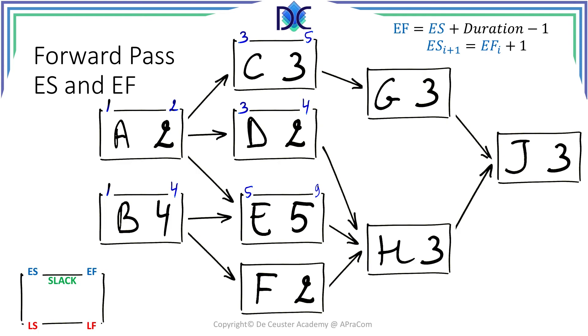For F it's a little bit easier. There is only one predecessor so F can start on April the fifth. F takes two periods so F will finish on April the sixth. Activity G, the same thing, 5 plus 1 is 6 and the early finish time is 6 plus 3 minus 1 which is April 8.